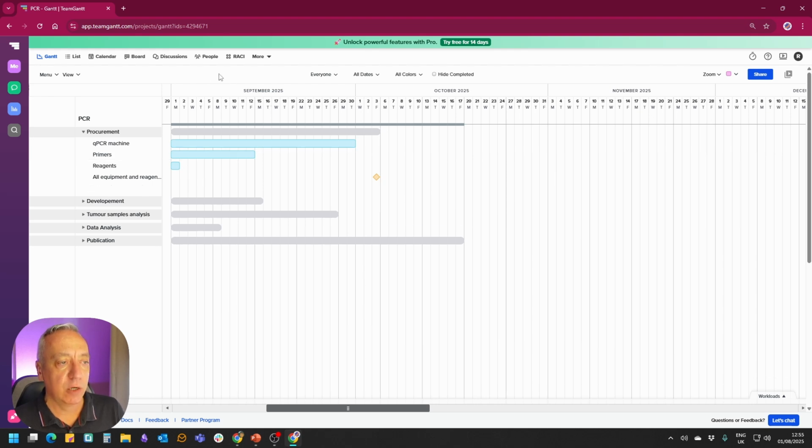As I did that, I also identified a first milestone, which means when I have completed all the procurement activities, I will decide that this is a first point in time that is important in my project, and I'll put it here. This is completion of all these activities. Now the dependencies have not been identified, and I will come to that.